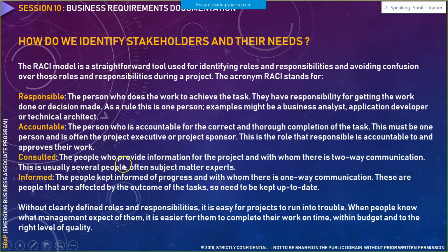They may be related to your project, or the participants may not be related to your project. In that case, we call that particular person an expert judge, and the technique is called expert judgment. So let's say you are working as a business analyst in a particular domain. Now you have 2-3 options in front of you. How would you rank those 2-3 options, or how would you obtain the benchmark between those 2-3 options, that this is the best option that we have chosen? With the help of an external person or the external judge, you would be applying the expert judgment technique.